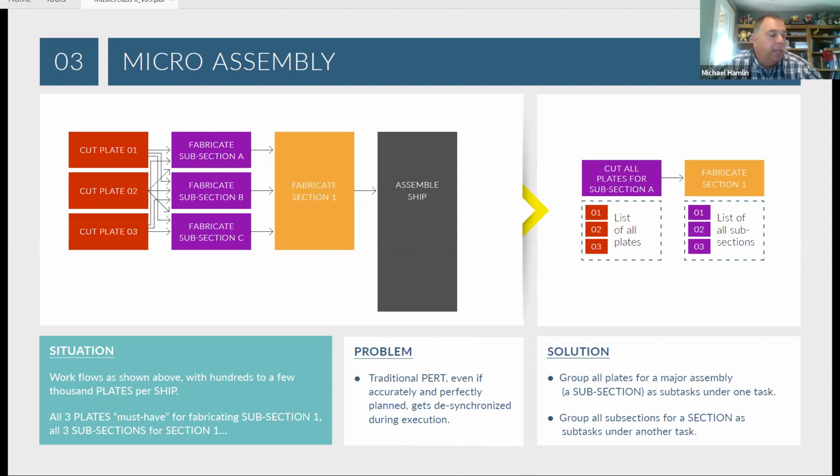This really goes back to the example that Sanjeev gave last time, where he showed the blue resources, the green resources, and so on, working in parallel and stretching everything out, versus being able to flow through the constraint and shorten the cycle time significantly. So it's really about finding what my constraint is, what should set my flow, and making sure I am subordinating back before that and scheduling the work to be done into those as well.